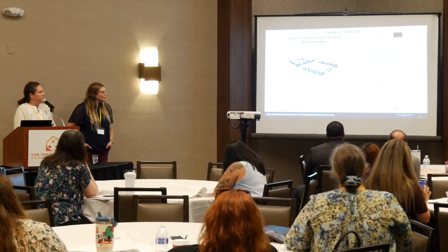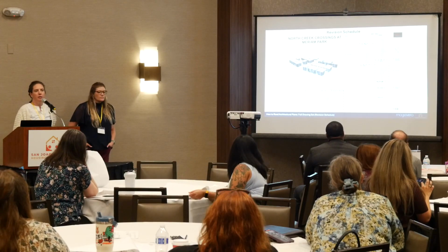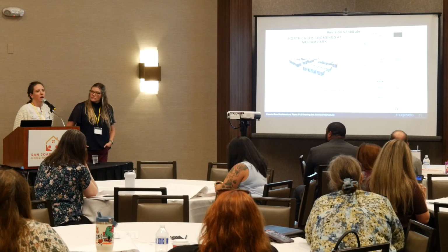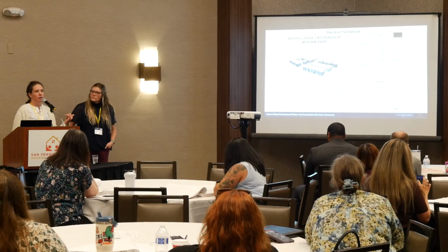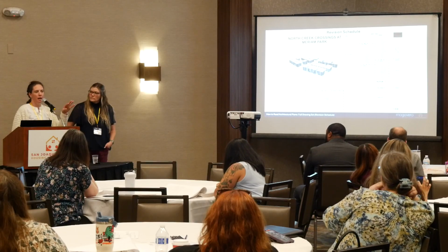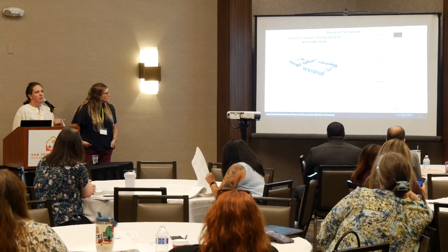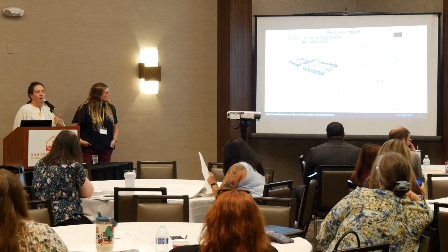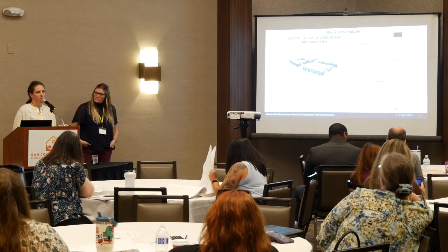And then another thing that you'll find on the early sheets are revisions. So when we first submit to plan check and they give us comments and we change things, we need to document what we changed, both for the plan checker and for the contractor and the client. If the bid has already been done, we would cloud it, and so they would know what has changed. Those changes could happen because of a plan check comment, because of a change requested by the client, or a change requested of the budget.